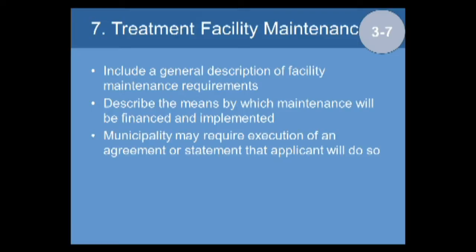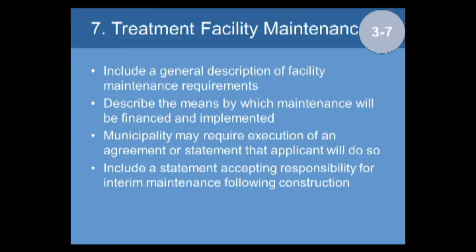Typically, does Santa Maria use a standard agreement for O&M? That's pretty much goes that same basic process. And then the stormwater control plan needs to include a statement that once the facility is built, the contractor and the original applicant will be responsible for ensuring that it's maintained right up to the point where it's transferred and moved into your longer-term operation and maintenance verification program.